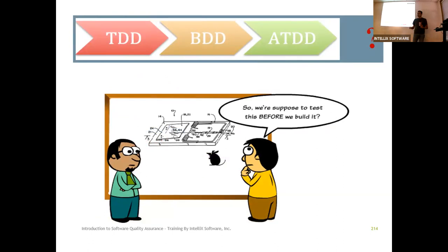In agile projects, every phase you go back, sit down and write the same over. Not every phase, actually. It's happening every week. Maybe the product owner will set up recurring meetings with the teams to review what business has proposed as part of the features, because it's a continuous process. Every week they might have one meeting just to do the product backlog grooming. It's called product backlog review with the team. You might come up with more questions and they have to go back and ask for clarification. Most of the time, business will be there when you are reviewing the stories as a team.